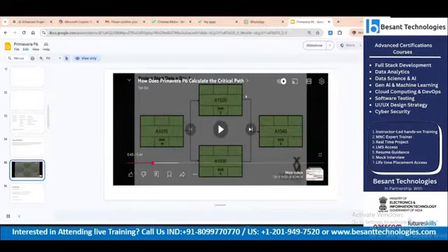From this network drawing, can you understand the concept that A is the first activity? It has two successor activities, B and C. Clear? Yes, ma'am. And B has only one successor, which is D, and C also has only one successor, which is D. That means we can say D has two predecessors. Yes. So likewise, we have this network diagram.